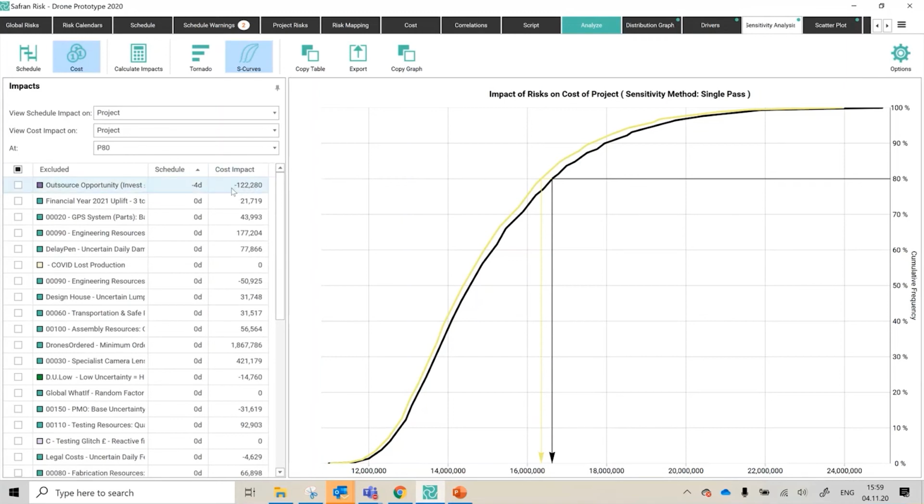And furthermore, that £5,000 converted into £122,000 of savings. This is because I used that blended approach of pre and post mitigated in the same model. I can now learn that, whereas I couldn't have done it as easily with separate pre and post models. But clearly you can do either, I'm just demonstrating the capability, I guess.